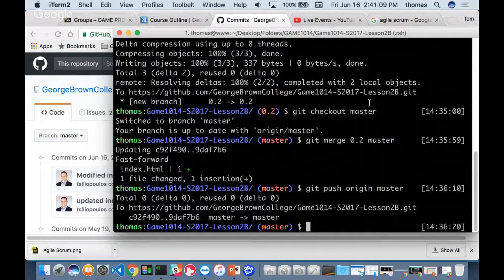Each of these is an iteration, but we're still only doing one release. So each release, again, naming conventions here, right? Each release is your major milestone. When we talk major milestone today, it means your major release. It means your first playable, your alpha, your beta, your release candidate, right? But I'm going to do multiple iterations for each release.